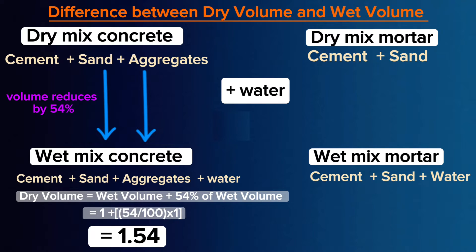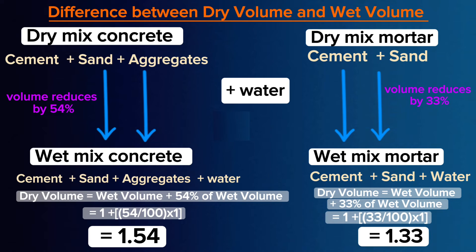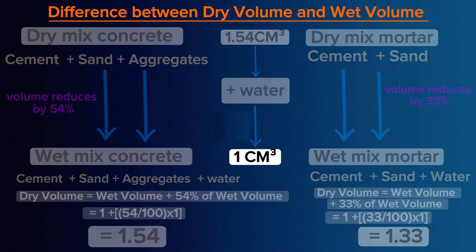This concept also applies to mortar. Cement simply mixed with sand is a dry mix volume. So when you add water, this mix reduces by 30% to 35%, so on average we consider 33%. In simple terms, when you have 1.54 cubic meters of dry mix and then you add water, it reduces by 54% and you remain with 1 cubic meter.